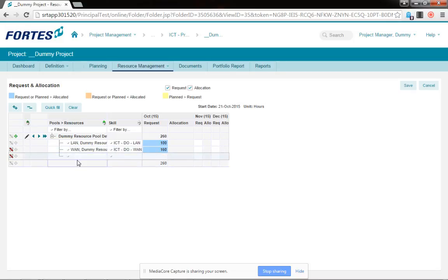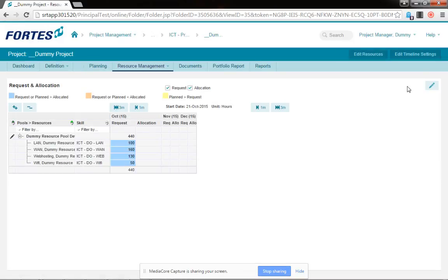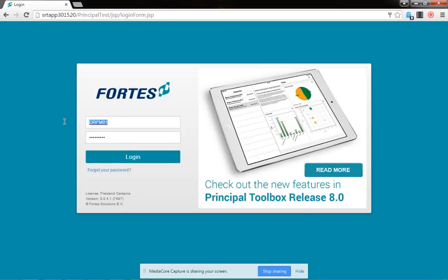160 hours of one is needed. I need him also for 130 hours to do the web hosting. Wi-Fi is relatively small with only 50 hours needed this month. So now important thing to note is the minimum unit of time is 1 month, and we can request for more than 1 month. It could be 3 months, 6 months, right? Yes, that's all possible.